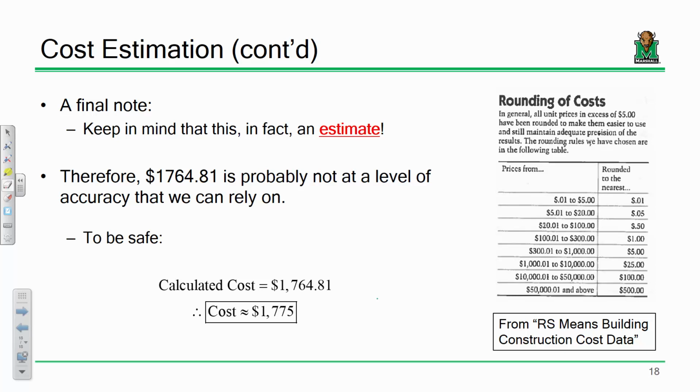Another point I would also mention, and this is something I haven't talked about yet: have you all ever heard the term waste factor before? Okay, if you haven't, just so everybody's clear, let's say that I'm casting a driveway out of concrete. Now I can do length times width times thickness to determine a volume of concrete, and let's say that it's, I don't know, 15 cubic yards.